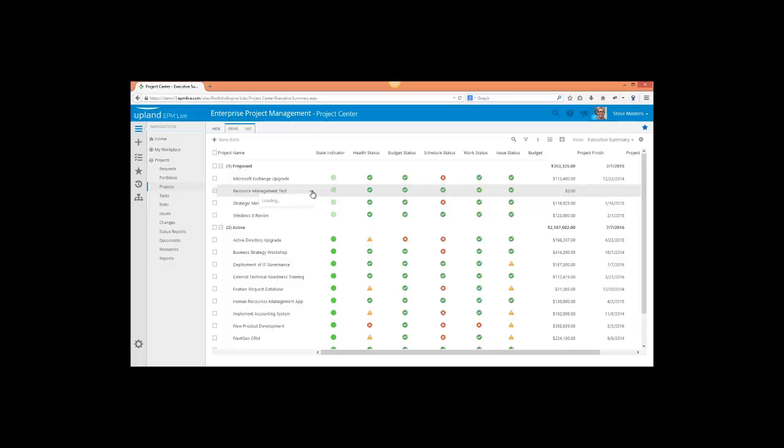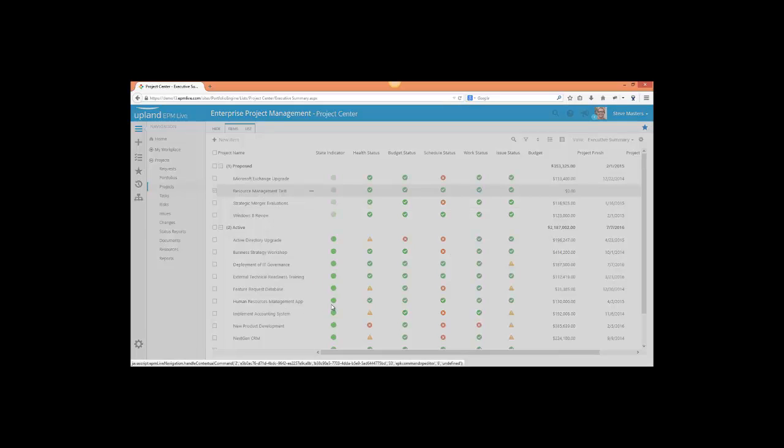Now I'm not building a detailed project schedule yet. I'm just building a high-level resource plan so I can start to get an idea of my resource load without having to go build that detailed schedule. It might take me weeks to build, and we might not even be doing this project if it doesn't get approved or if it gets delayed or whatever it might be. So later on, I'll actually build my detailed project schedule, but first I can start with my high-level resource plan to answer those 2 questions that we mentioned.